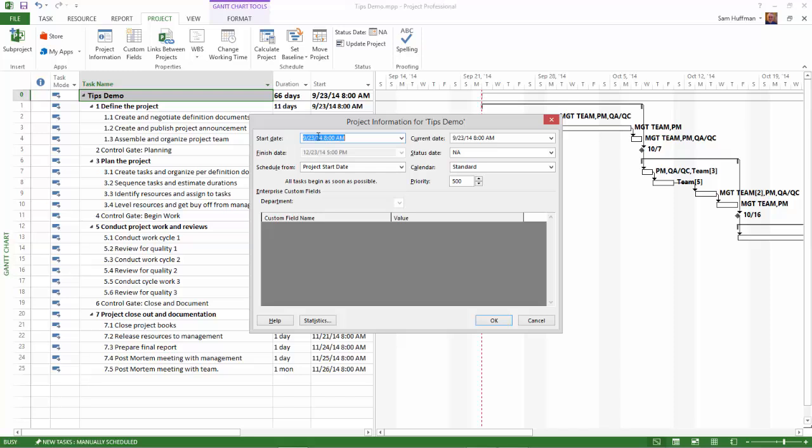So that's how you do it. One final note here: watch out for constraints in your project. They may create gaps in your schedule when you change a project start date. I'll have more information on constraints in a future webcast.